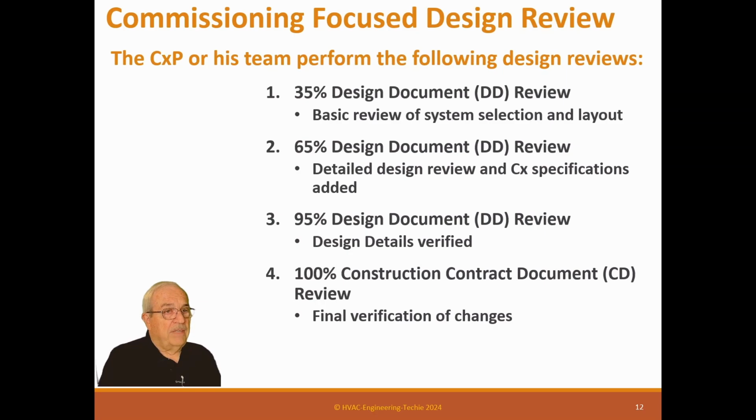documents. And then the fourth review is 100% construction contract documents, CDs, and your final verification of the changes. So this is the set that's going to go for construction. So at this point, you're verifying that any changes that were recommended earlier actually got in this design.